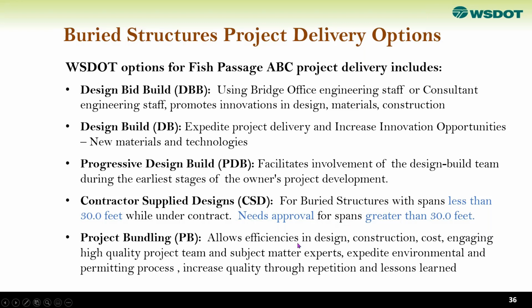And at WSDOT, we are also participating in the FHWA's bigger group of project bundling. This has advantages to us. There are several project bundlings going on right now in Western Washington for fish passage projects that allow efficiency in design, construction cost, engaging a high quality project team and subject matter experts, expediting environmental and permitting processes, and increasing quality through repetition and lessons learned. So you're going to have 10, 20 or more projects in one project. So this is a lot of lessons learned that could be applied to the project.